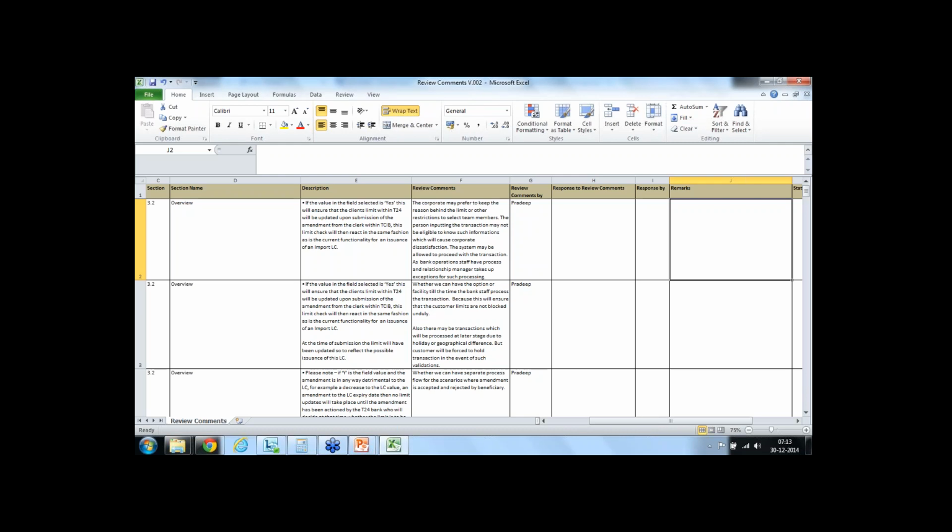And one more critical thing you need to be aware of is that whenever changes happen, changes are actually more difficult to accommodate than a new item, because when you're working on a new item, you can create artifacts easily, since everything is new and the output side is totally blank. You are just creating that. Whenever changes come, you need to rework all your outputs, I mean your documents or your flow charts, so that will take more time and effort. So you always have to ensure that whenever you provide an estimate, you take these aspects into consideration.